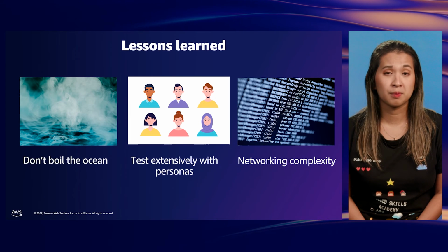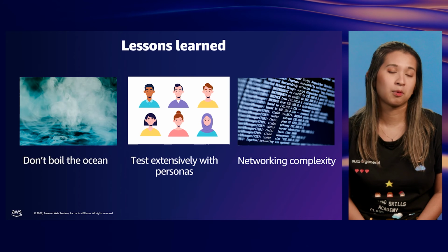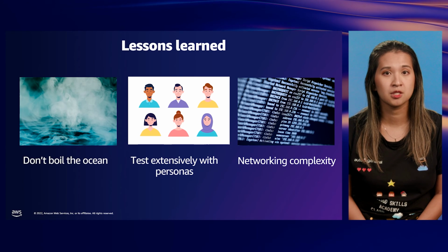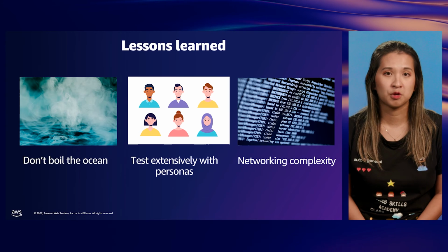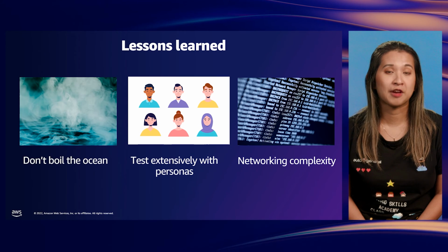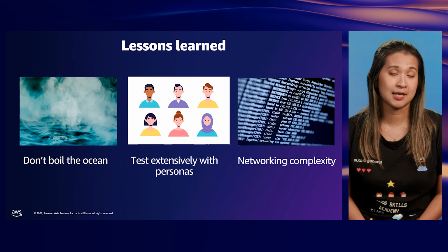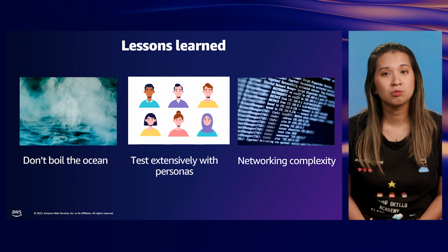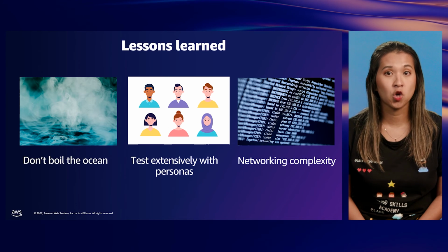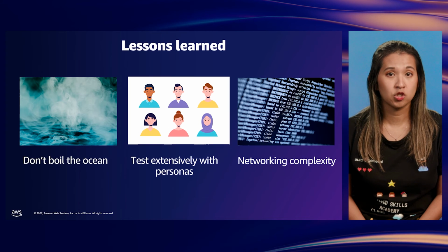If we could have started from the beginning again, we would have started off with a smaller proof of concept per project. We would have involved stakeholders on a persona basis who are part of the project, like developers and product owners, to do some quick and focused testing to fail fast and fail early. After all, we're doing this to improve their day-to-day task. We found that we spent too much time planning this large implementation and didn't catch all the exceptions, which are quite unique to many projects that we do.